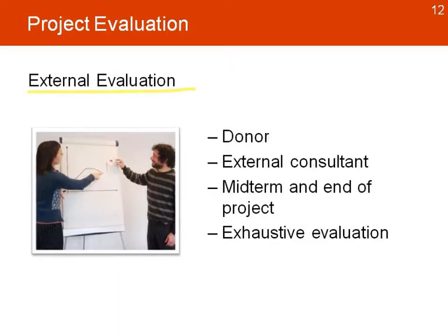The external evaluation is usually required by the donor. We need the help of an external consultant, somebody with the expertise, especially in a specific area the project is working. They happen at midterm and at the end of the project, and it's an exhaustive evaluation, looking at everything, all the data from the beginning to the end.